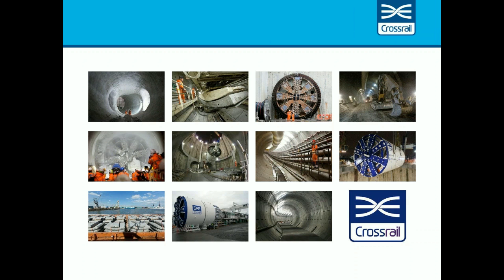On the main design, we have been using what we call engineering progress and performance reporting, EPPR, which is essentially a form of earned value to manage or provide visibility on the progress of design. So at each key stage of the design, we assign a fixed percentage completion, and then once that part of the design is signed off, it earns that amount of progress.